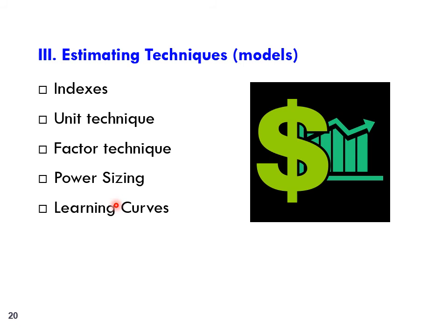But of course, it has the potential to be more accurate. But if you spend less time, it will be less costly. It's a less sophisticated method, let's say, but it will be less accurate at the same time. So there is a trade-off between the cost of estimation, the time of estimation, and the adequacy.